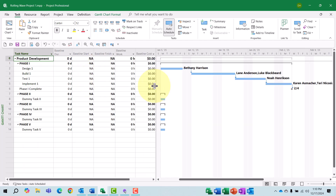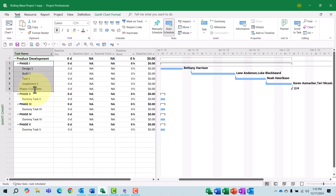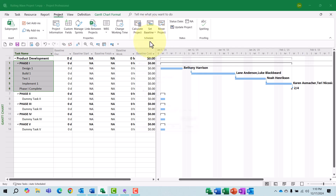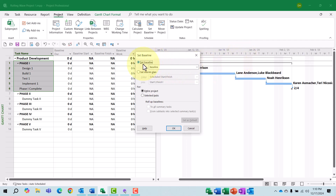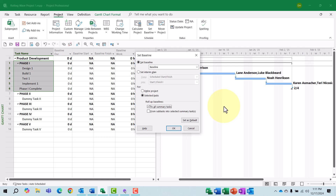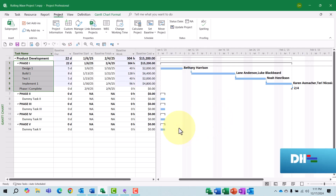Let's go ahead and drag the split bar over to the right edge of the baseline cost column. To baseline only the tasks in Phase 1, I'll highlight Phase 1 through Phase 1 Complete. Then I'll click the Project tab to display the project ribbon. I'll click the Set Baseline Pick List button and choose Set Baseline. In the Set Baseline dialog, I'll leave the Set Baseline option selected and I'll leave the Baseline Set of Fields selected.